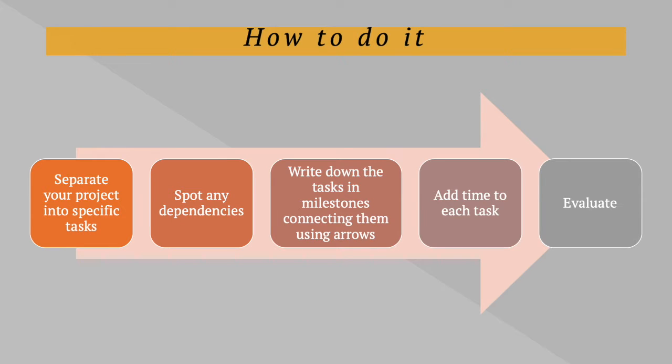Also, for each task, we have to settle the minimum time to start the activity and also the maximum time to start the activity. This period of time is going to be the slack, or the looseness of the time to start the activity, without hurting the integrity of the whole project.